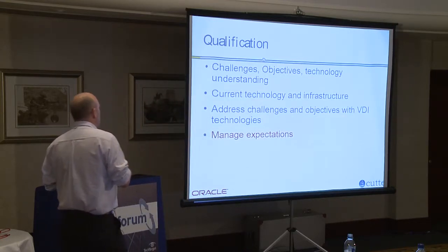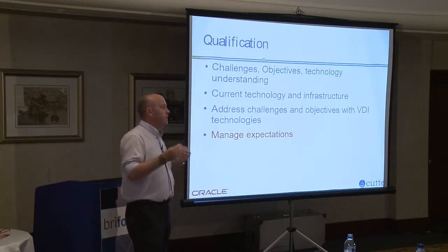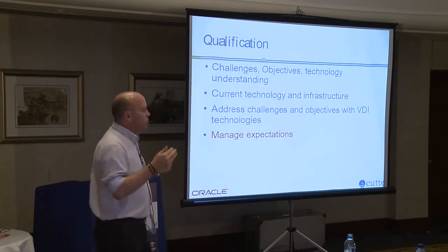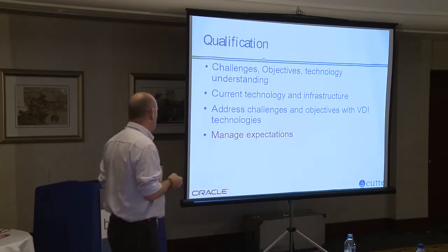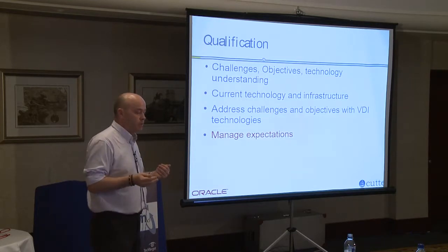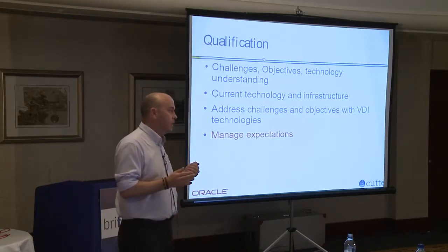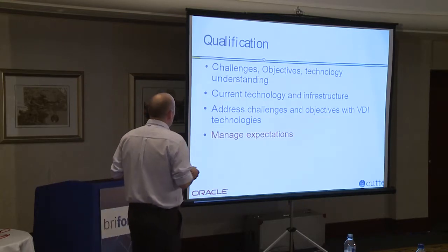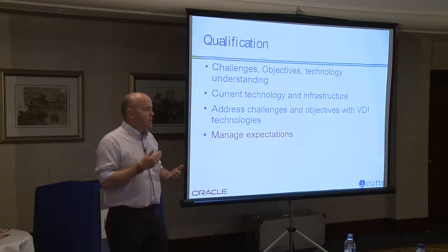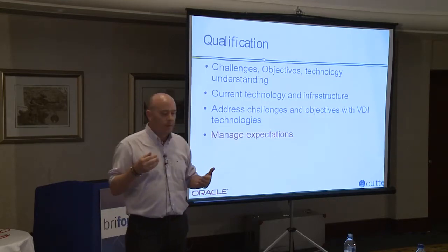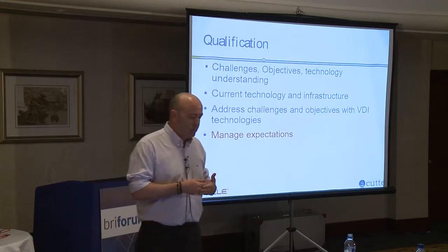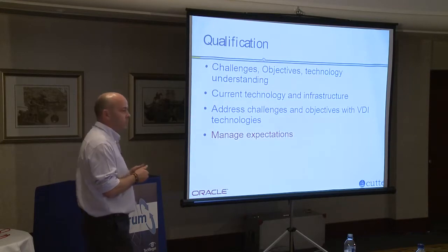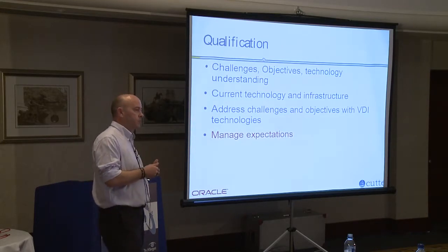So: challenges and objectives, and technology and understanding. You've got to find out where the pain points are for your customers. The technology will come as you understand what those pain points are. And you've got to look at what their long-term objectives are. Again, there's an awful lot of short-term focus looking at VDI deployments, possibly because it's the cool technology on the block. You need to understand their current environment, and you need to understand their current infrastructure as well. There have been a number of occasions where we've turned up at sites that have had VDI deployed, and there have been multi-server racks put in with 4 13-amp power supplies in the server room, etc.